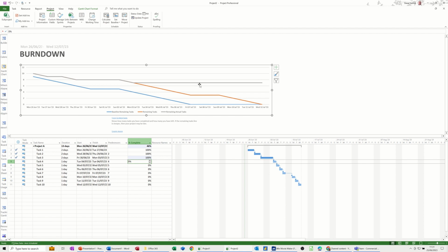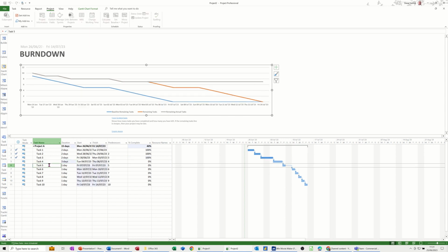And it's Planning Wizard telling me I can just drag that down, but that's okay. And then if I put 3 days on that, you can see the gap between the baseline and this line is getting bigger and bigger. Basically tells you there that if the remaining task line is steeper, then your project may be late, which it is. It's a lot steeper. So as you're coming down and you're changing these, that stays the same.